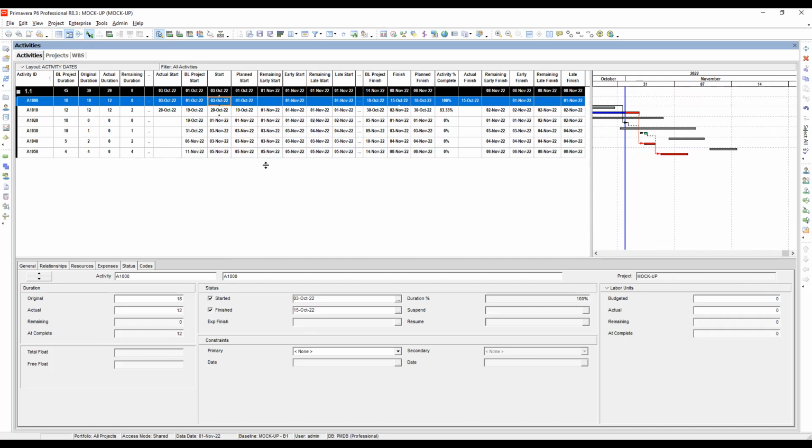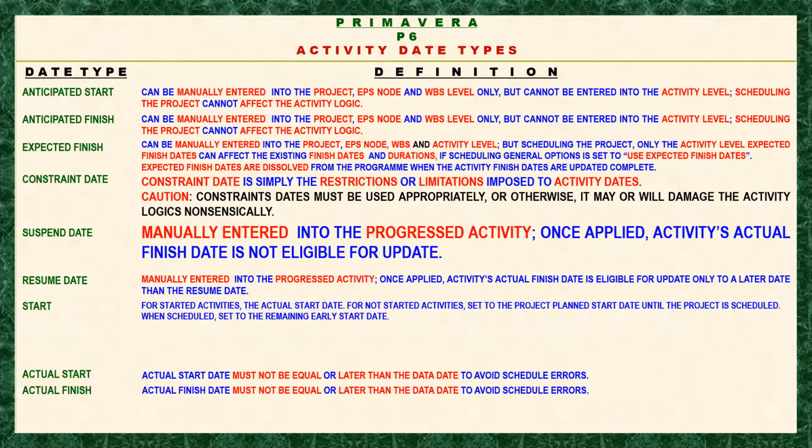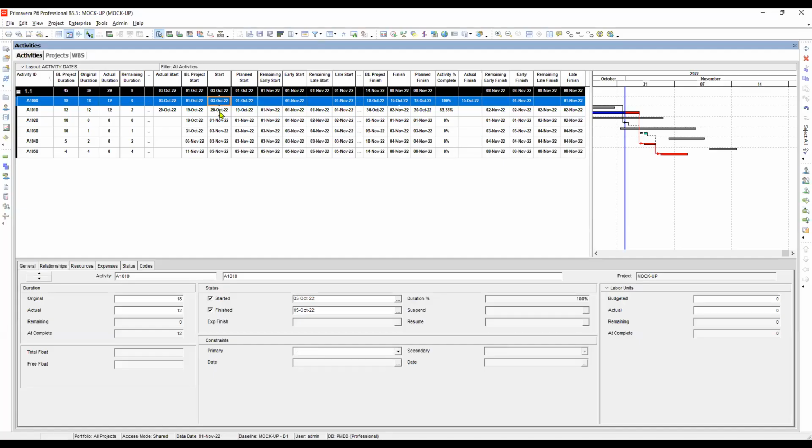what happens to the start date, since it is already completed? What is our observation here? The observation is that when the activity has not started, this was equal to the early start date. This one. But now when it has started, it is equal to the actual start. So this is our actual start, right? That is our observation there.